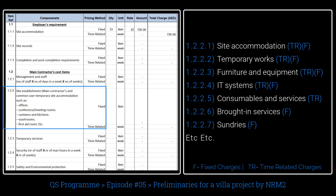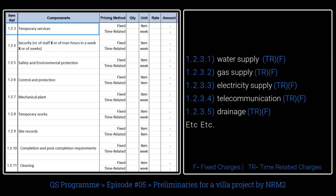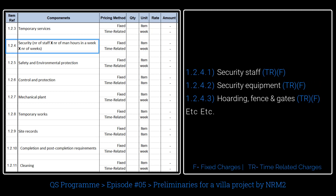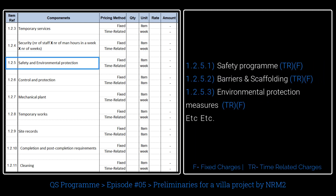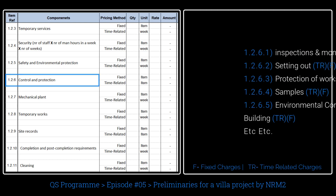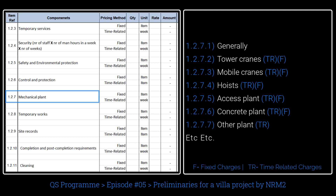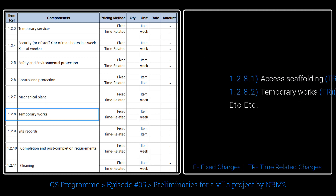Site establishment includes offices, meeting rooms, IT rooms, and first aid rooms. Furniture items may be fixed or time-related costs. Temporary services include water supply, gas, electricity, and telecommunication, etc. Security includes equipment, staff, fencing, and gates, etc. Safety and environmental protection includes safety programs, barriers, and safety scaffolding, etc. Control and protection includes survey, inspection, and monitoring, etc.